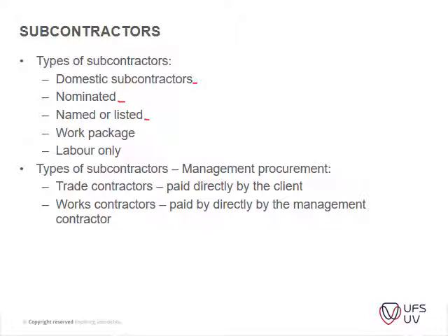Named and listed subcontractors are a little bit more like your selected contractors that we know of, but read through this. And then you've got work packages, which I'll explain a little bit later. And then you've got your labor-only contractors, which we do have in South Africa quite a lot. These are contractors where a subcontractor only brings in their labor to do certain sections of the project. Obviously, this also moves the risk from you to someone else.